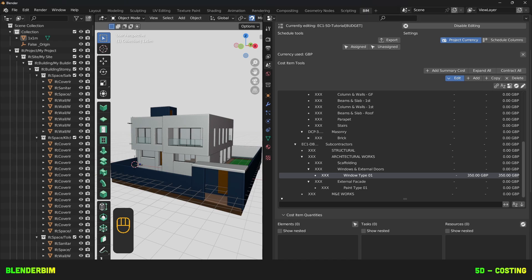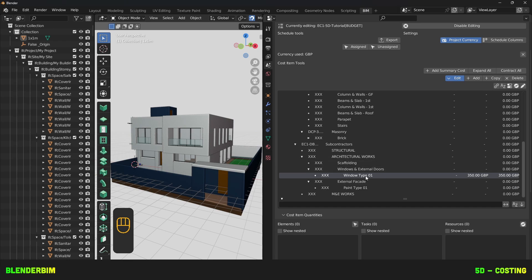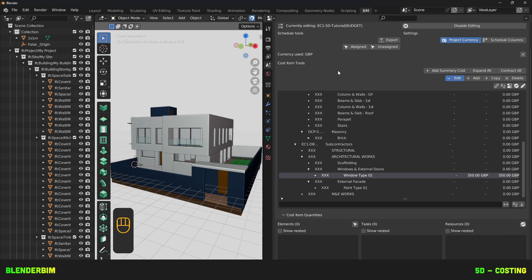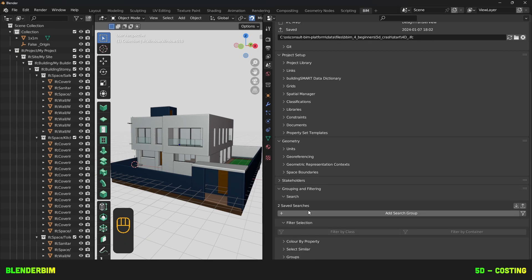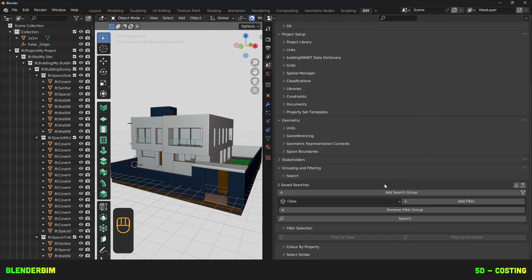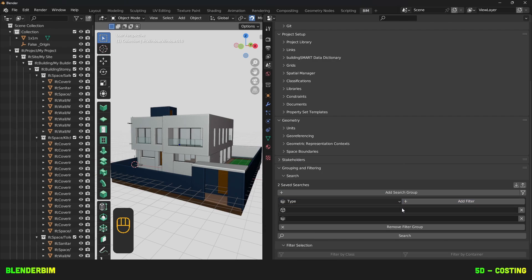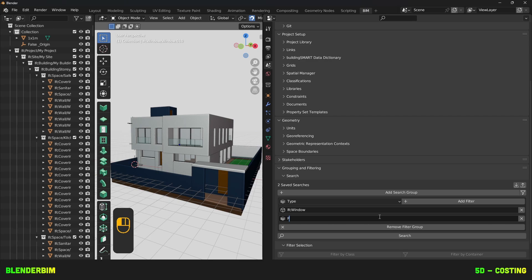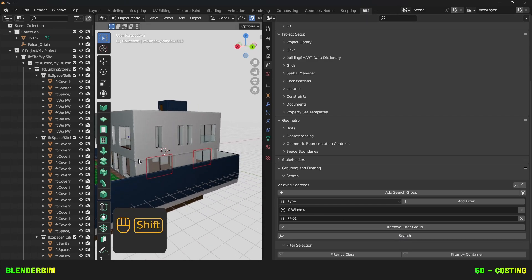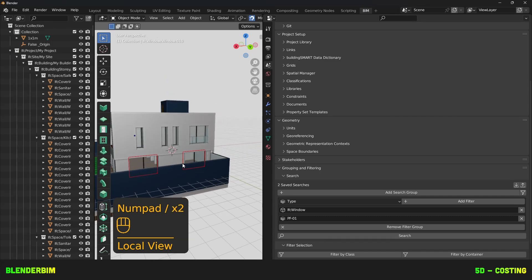We'll now create a quantity for this Cost Item. There are many ways to create quantities, either by counting, by deriving from building element quantities, by manually inserting quantities, by deriving them from tasks or from resources. We'll start with the count. We have our windows, which is convenient. So, we need to search for window types of the type 01. We'll head on over to the project overview. We'll go to grouping and filtering, and we'll add a search group. We'll be adding two filters, one for the class and one for the type. We'll be looking for any IFC window, which has a type with the name PF01. When you press on Search, this will select it in the 3D viewport. We can make sure we only have two. Yes, indeed.